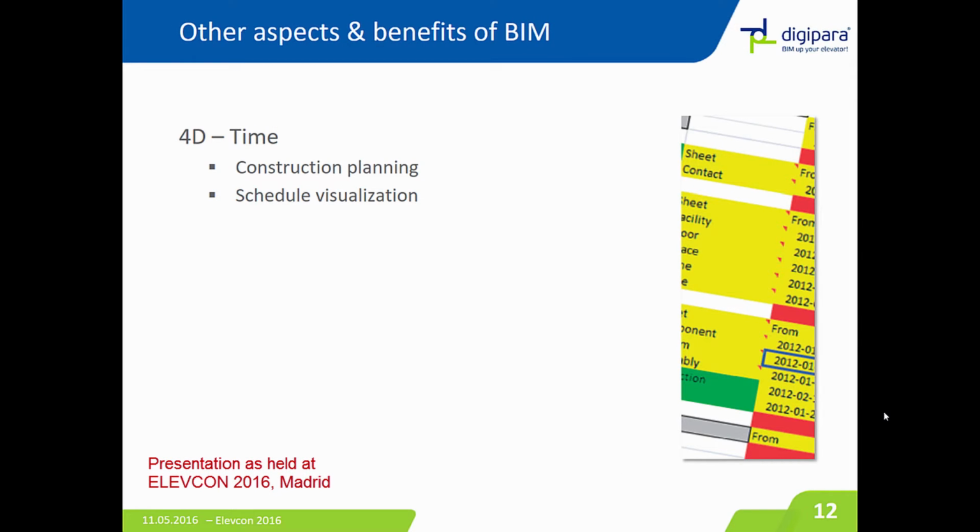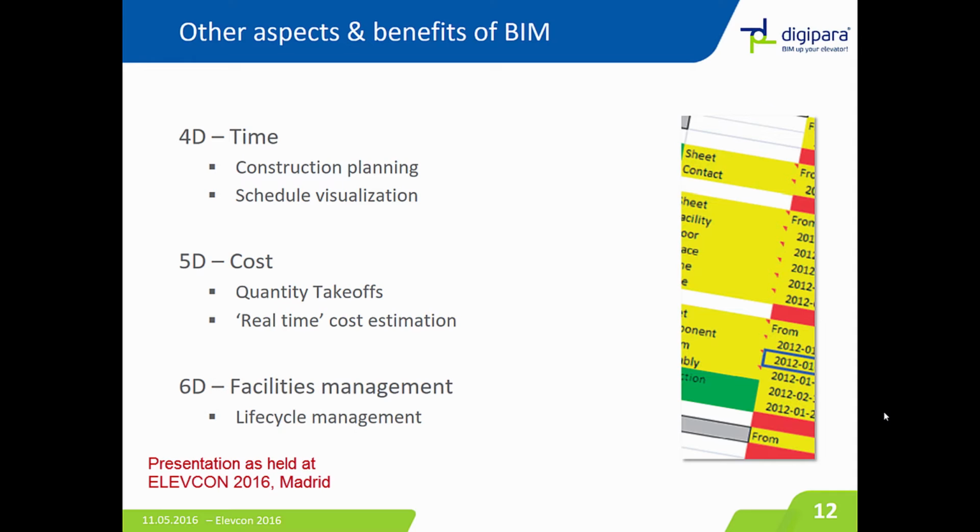There are several other aspects and benefits of BIM. I told you that there are different Ds, and 4D might be the time for construction planning, for schedule visualization. There are other Ds like 5D for cost, to make quantity takeoffs, or real-time cost estimation. And 6D might be facilities management and lifecycle management of your building.